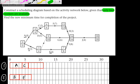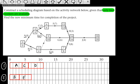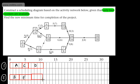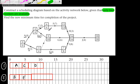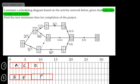I can now see that Worker 2 is standing idle and ready for the next activity. Logic might say to give them activity I, but activity I has a late event time of 16. Instead, I'm going to allocate Worker 2 activity F, since C has already been finished at this point and F has a lower late event time. Activity F has a time period of 7. So I allocate F to Worker 2 and add it to the scheduling diagram, marking it off.